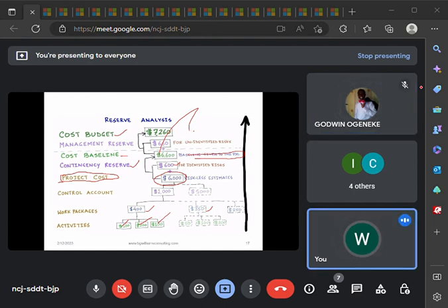During your risk analysis, you are trying to set up a place and you are starting with clearing of the land. That is after you have planned. Now you are going to execute. Part of your execution is that you now start to clear the land. While you are clearing the land, like in Lagos, the youths come around and say, before you start clearing the ground, you should settle us. Where do you get the money to settle those youths? Or those youths come in different factions. Faction A came, faction B came, faction C came. Are you going to bring police to stand by your side, or do you settle the youth?